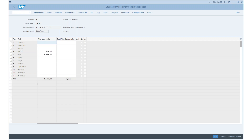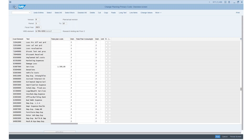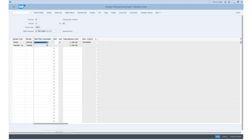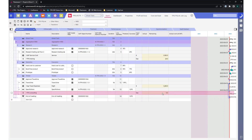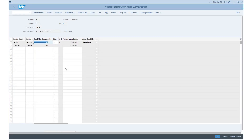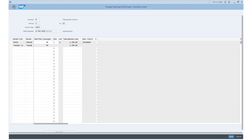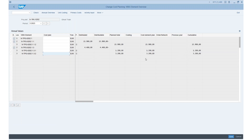Of course, you can get all the other information too. Let's check the activity input — these are the work hours, 40 hours. Five days spread out to eight hours of working per day, all in April because the task starts and finishes in April. The interesting part is that we have planned costs of it because SAP knows from the cost center and activity type that these are also planned costs. And in this overview we have the total of planned costs — not only the hours — so now we know how many resources we need and have planned for our project.